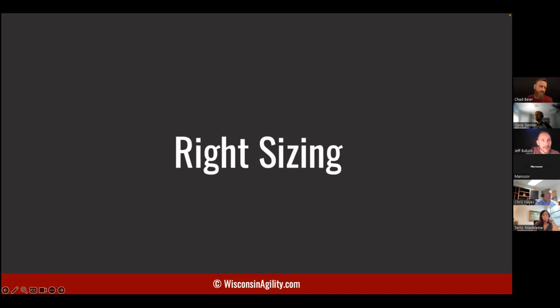All right, hot topic item, right sizing. We fall into the camp nowadays where we don't think people need to story point things anymore. They don't need to size things that way. There are better ways, and right sizing is what we mean by that: getting things into a size that can be done within a sprint. And we have to think of sprints more as containers of risk, not so much feature containers or work containers. Okay, so we're going to dive into a little bit more about what that means.